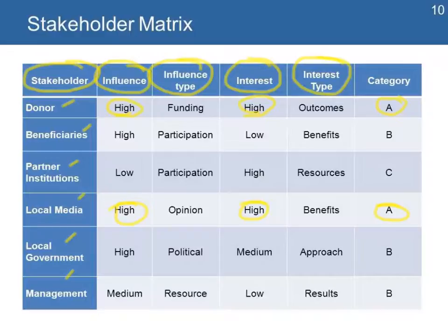This is an exercise that happens at the beginning of the project, when the team and some subject matter experts or project managers from previous projects who have an understanding of the stakeholders meet, develop this matrix, and organize that information. This information helps the project manager have a baseline of where the stakeholders are.